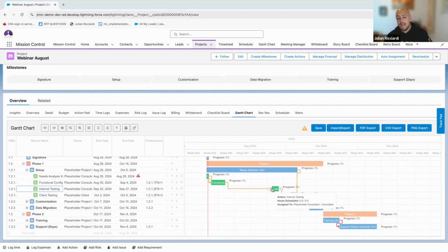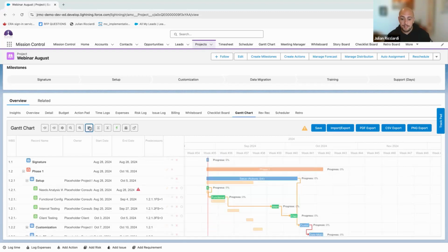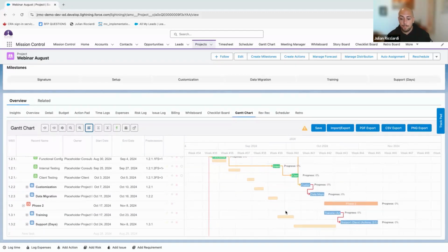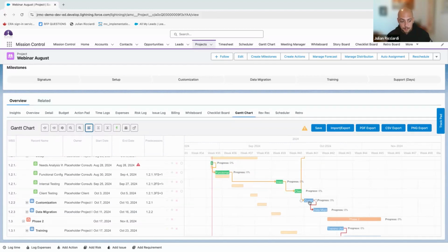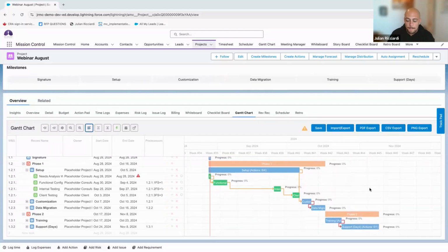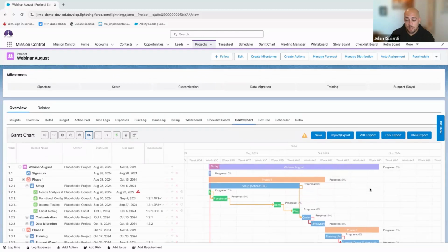Now the question is, let's say you have to make a change. It could be based on a change request. You could just do it natively, really based on your processes. But if you're interested in that baseline, we will always have an understanding of what that original baseline was. So you could maintain a variance between where you're at, where you were, and where you were supposed to be. This does exist on a more global level, but I'll jump into that in a bit.